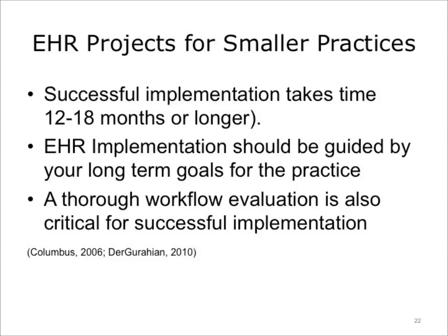For a single physician practice, you should expect the project to span from 12 to 18 months at least from start to rollout, or longer for practices with multiple physicians. Implementation of your EHR should be driven by the long-term goals you wish to achieve. You should begin by evaluating your practice and looking for deficiencies or areas where improvement can improve quality of care and efficiency. Special areas to consider could include coding, medication management, quality improvement, patient satisfaction, and so on.